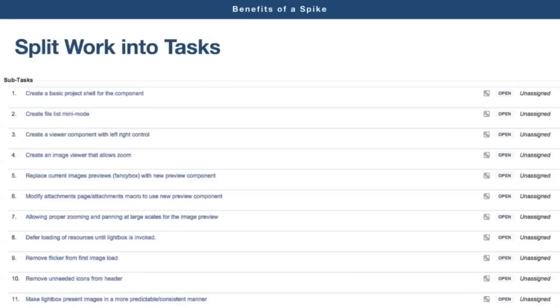Once you decided that spike is needed, the first thing to do is to establish the spike goals. Every spike has different goals. Some answer technical questions, some are about accurate estimates. So create a page with the goals and explicitly list what you want. Whether you want estimates, whether you want to split a story into a list of tasks, whether you want to evaluate different approaches, whether you want to have a demo at the end of the spike or not.